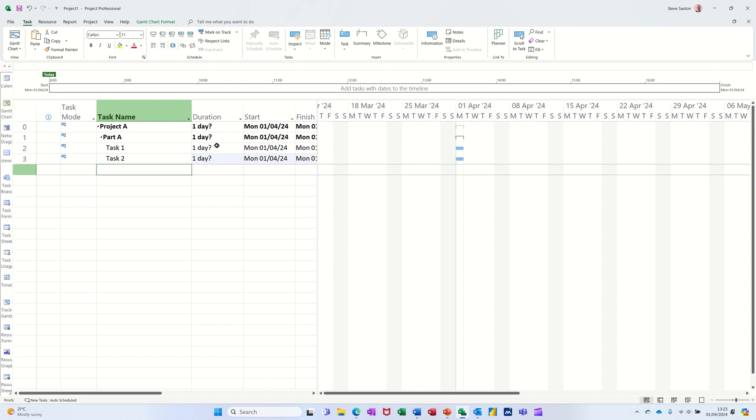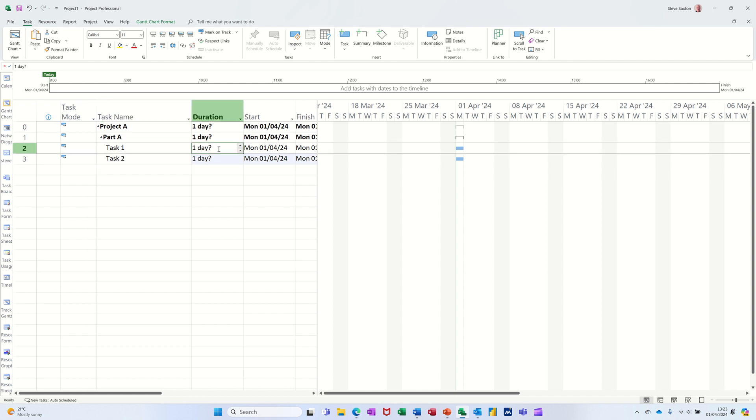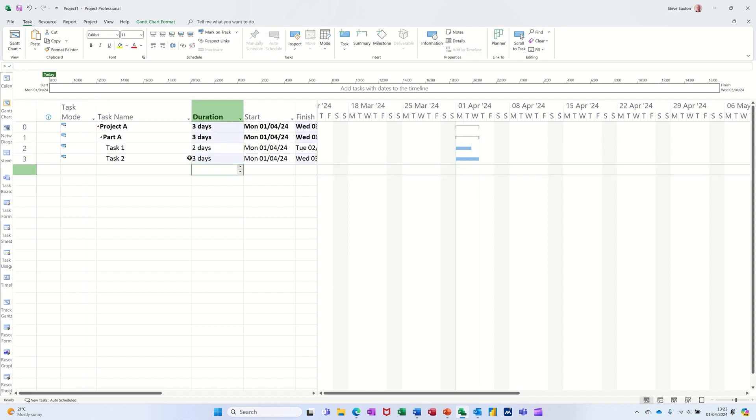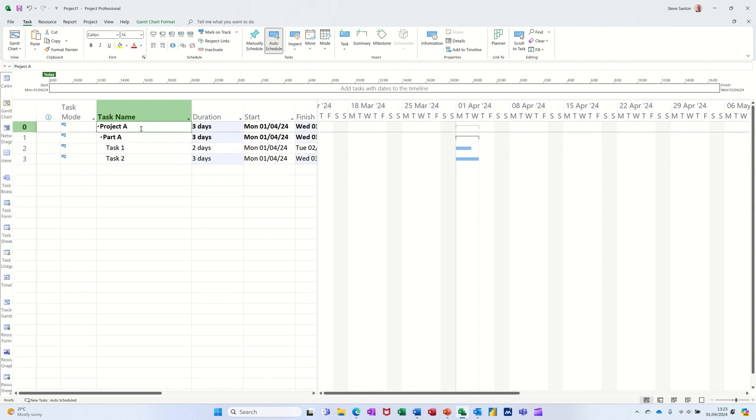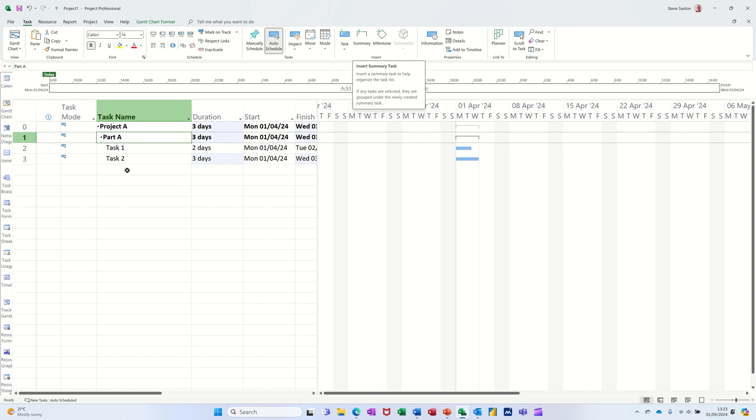The idea is that you don't leave this question mark on which is an estimated time. You could fill that in so I'll just put some figures in there. Now what's happened, all the question marks have disappeared because these two tasks have now got a duration whether that's estimated or not. So that's the project summary. This is a summary task that you've created from the task tab on the ribbon.